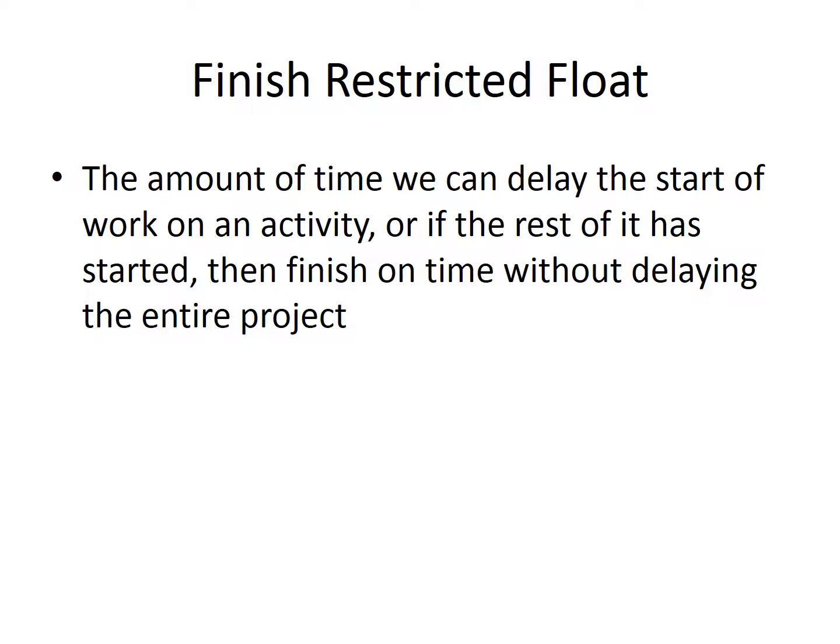Generally speaking, it's not universally true, but I find it's easier to give examples toward the end of a project with this one. If we're talking about an architect's punch list, for example, I might have some flexibility with when and where I can start that. Obviously I have to have work in place completed, but it absolutely must be finished by a certain date without delaying the successor activities. So finish restricted means essentially that the finish of the activity is critical.